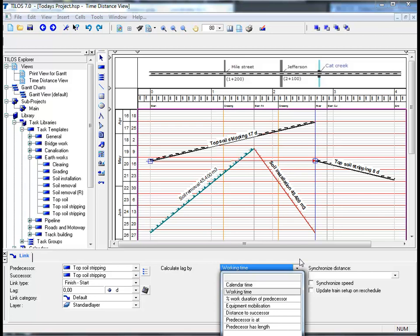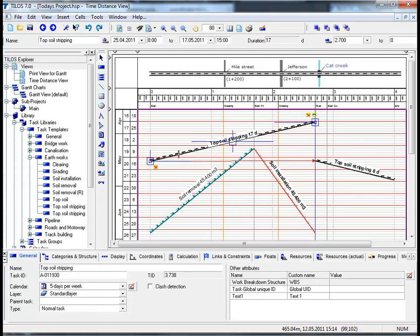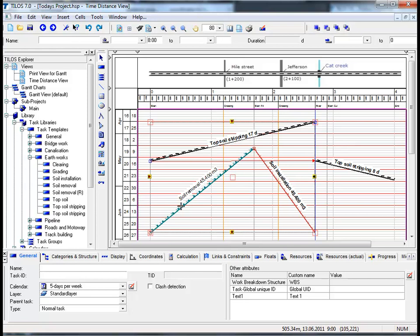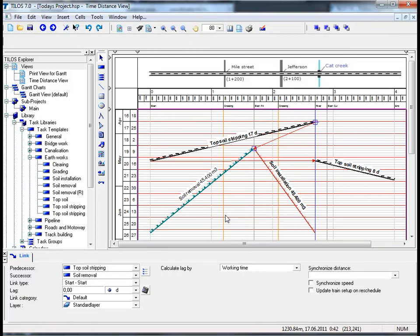This will be discussed later in our tutorial. Another effective way of linking unlinked tasks is by using your right mouse button. Highlight the task Topsoil Stripping, click on it, and using your Control button, click on Soil Removal. Using your right mouse button and the context menu, choose Link Unlinked Tasks. The unlinked tasks have now been linked, and viewing the Details Toolbar, the link type is Start-Start - simply because both tasks overlap in time. If this were not the case, a Finish-Finish link would have been created instead.